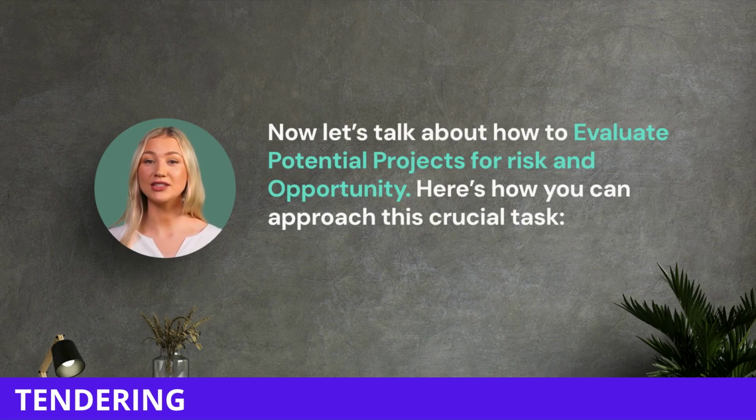Here's how you can approach this crucial task. Risk analysis. Every project comes with risks. Start by identifying any regulatory challenges that may arise. For example, does the project comply with local zoning laws, environmental standards, or safety regulations? These are things that can delay or even halt a project if not addressed early.